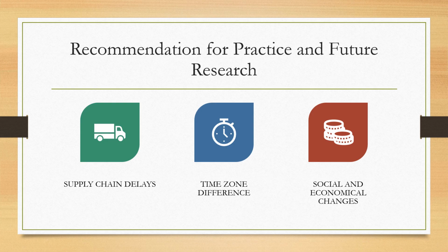Some of the uncertainties that we faced during the project are supply chain delay, time zone difference, and social and economic change. To ensure that our future projects are not affected by supply chain delay and economic change, the organization should ensure that all needed project resources are purchased and delivered, if possible, before the project is started. Although most would not see the benefit of this recommendation at the moment, I do believe that the company would be much more prepared to deal with any of these issues if they plan ahead.